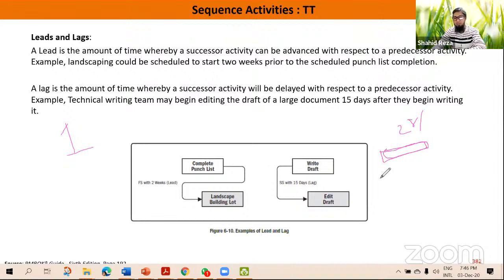So if we use just like this roof casting, and then the next activity is say new pillar creating on the roof. If this relationship is finish to start, then what happens? After roof casting, immediately the next day we can start pillar creation on the roof. But practically, that is not possible. So that's why we use lags.